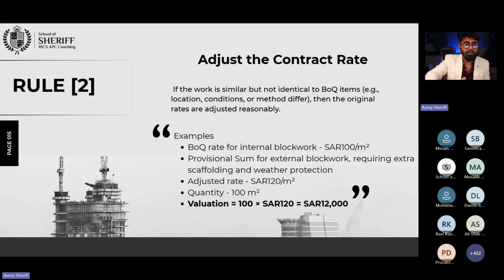When it comes to double height, 12 feet, you need double height scaffolding, right? And also your productivity will be less. Here the people will quickly start to construct and go. But when it comes to double height, the people's work productivity will be reduced. Am I right or wrong? And you need 2 layers of scaffolding. Am I right or wrong?